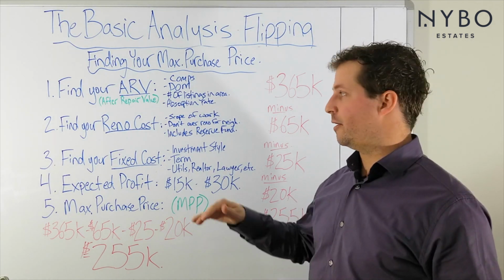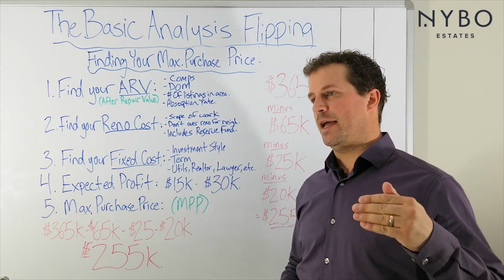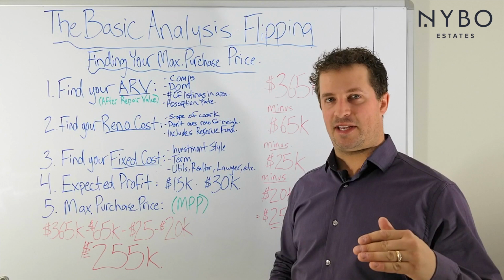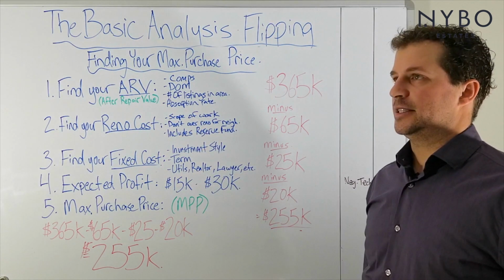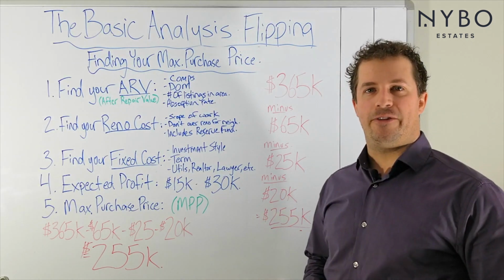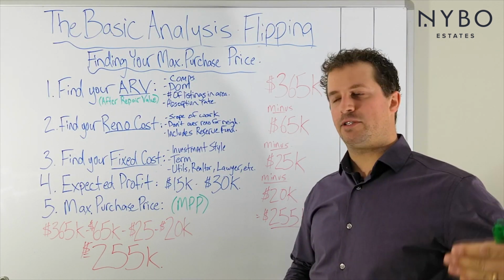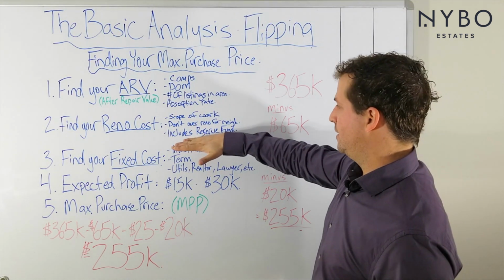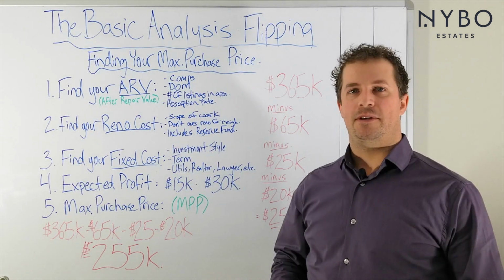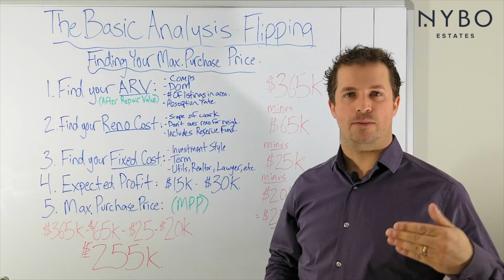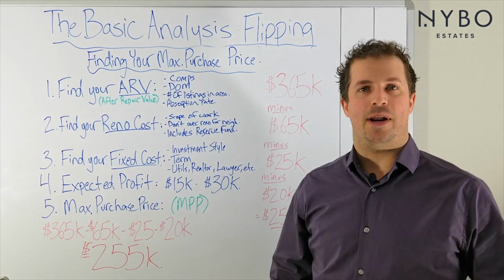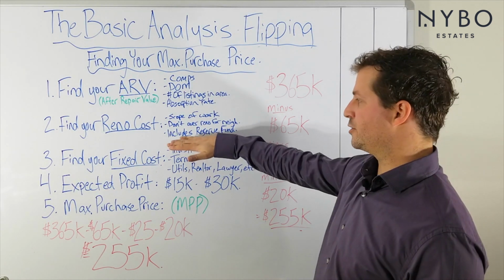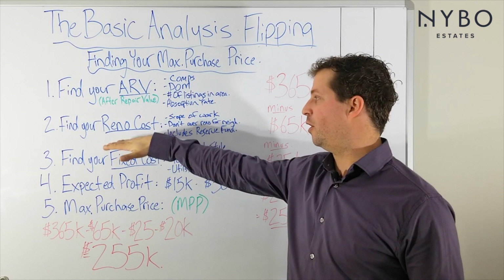But I raise capital for my projects, and if I had to recommend something, I would say raise more capital than you need, just in case, because it's hard to maintain cost control on flips versus like a new build or an infill or something like that, just because there's a lot more variables. You don't know what you're getting into, and you know how that goes once you open a wall up and you can find whatever, asbestos, anything, and that can drive your cost up substantially. So always account for that.